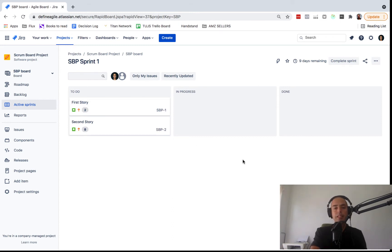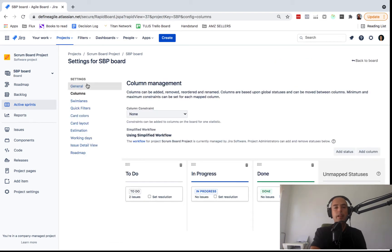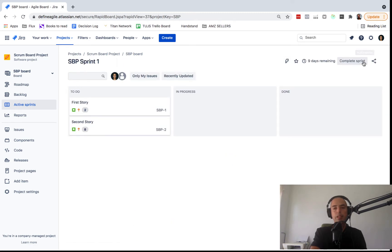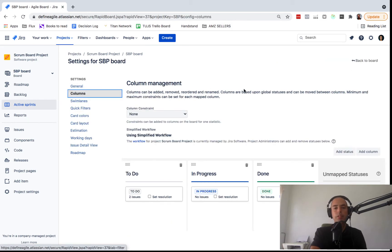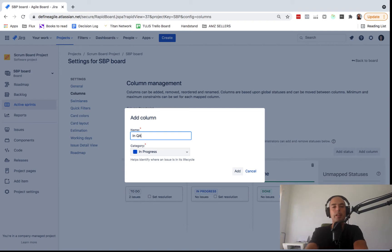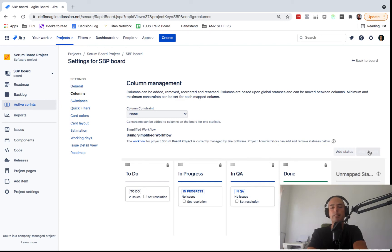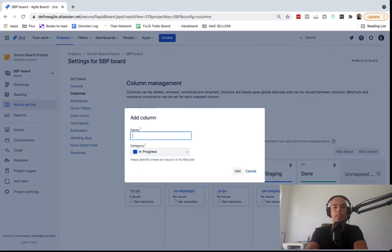You may want to customize the board if your process has additional steps. For example, if you have a QA stage, go to the three-dot menu, click Board Settings, then go to General and then Columns. Here are your columns — you can add more. Let's add a column called QA, then one called On Staging, and then On Production to track where each ticket is.